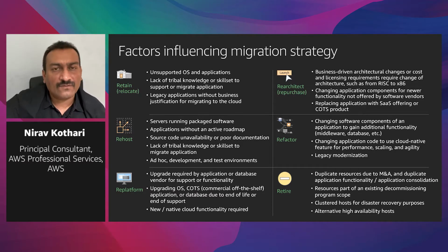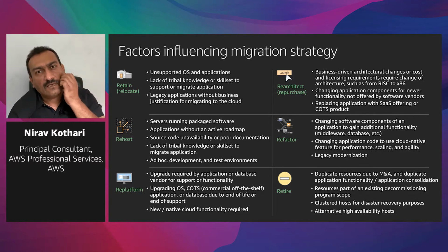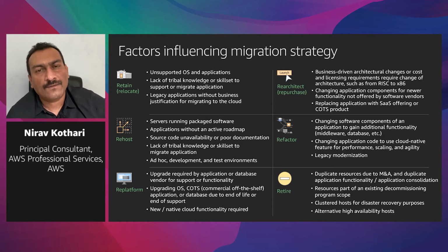Rehost, imagine servers running packaged software. Imagine application that was developed in the past, which doesn't have enough of good documentation. There's no code available. So any one of those examples, COTS, commercial off-the-shelf, where you're just running it on a host. Even by doing anything else, you're not going to gain any new functionality, or application which doesn't have enough of documentation, no source codes available, and therefore you can't touch it, even if you want to. Those are good influencing factors for you to consider rehosting an application.